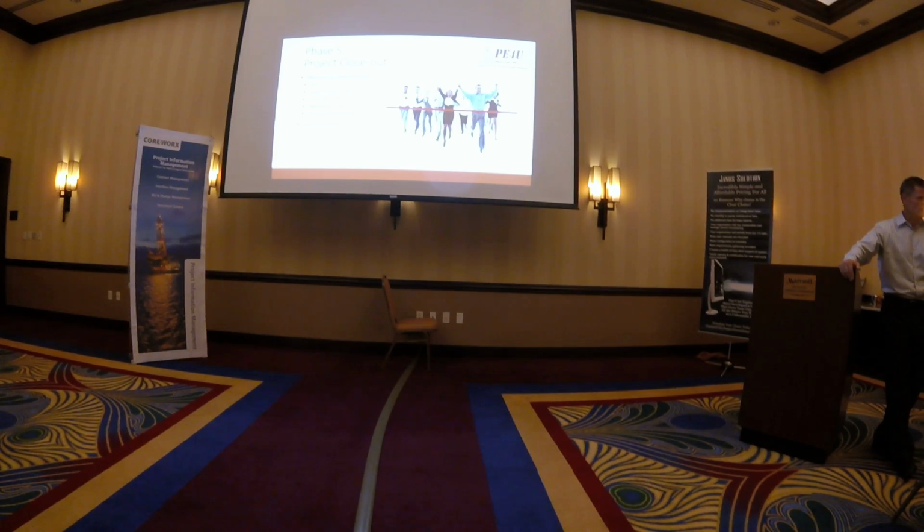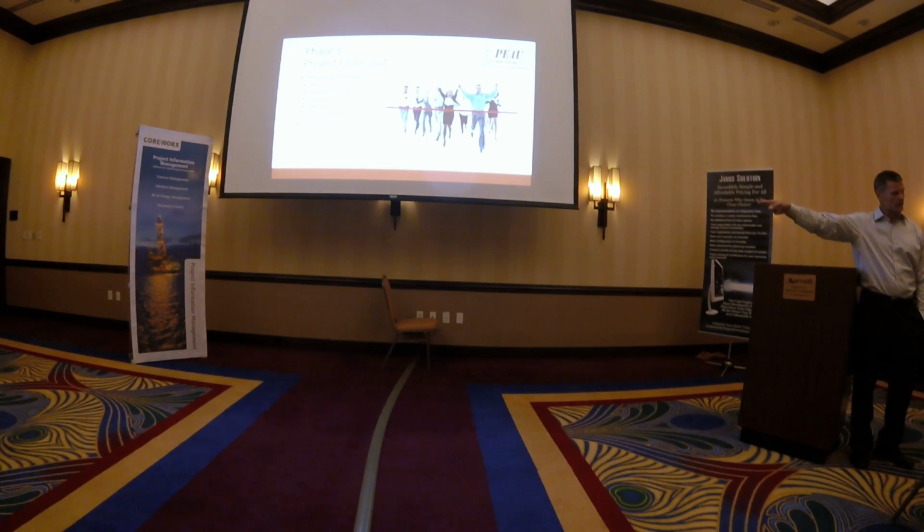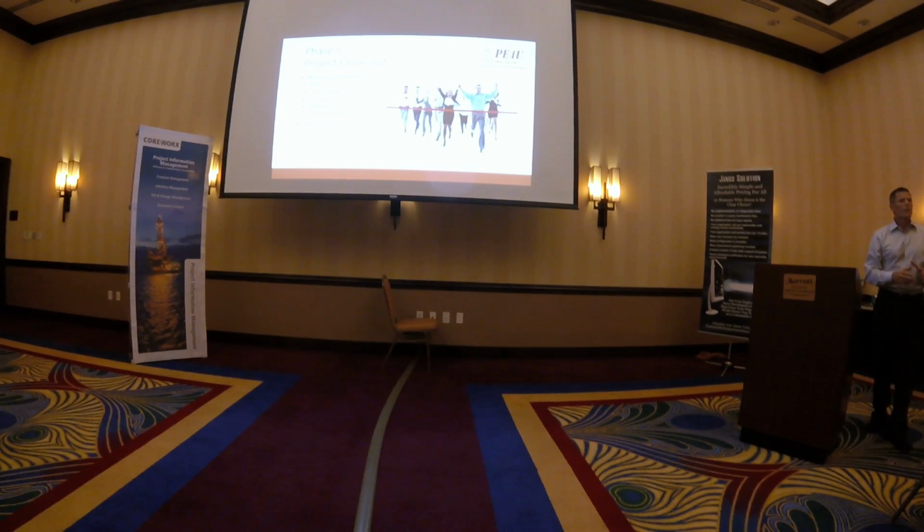Now, lessons learned. The key to success is don't do lessons learned here. Start them at the beginning. Have a regular, maybe it's monthly, it doesn't have to be every week, but have a lessons learned format that you distribute, or a method that you want to do it, and distribute that at the front of the project and say, hey, over the life of the project, here's a format for you to write down the lessons you're learning. Then at the end, all you're doing is compiling